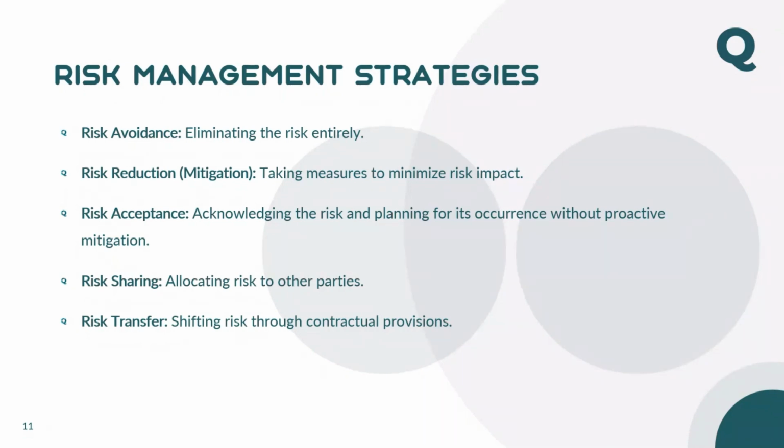There will be some items we are importing from other countries, and normally if it is a government client or a well reputed client, they will have good connections with the authority. So for the employer, it will be easy to get customs clearance. And in some countries, like Ethiopia, the client will get relaxation of tax also. If the contractor is procuring or importing from outside the country, there's a big tax actually. But when the employer is procuring, if the principal owner is the employer, there is a chance of getting tax relaxation. In that case, you will share the risk of importing and clearance.